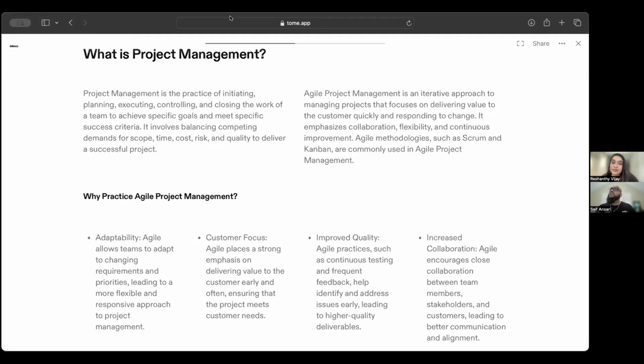So the technology department would go back to the drawing board and say, okay, they want to make these changes. Let's take a look at how we can make these changes. Sometimes it can be a quick change, but more often than not, it requires a potential re-architecture. And that's just one change. There could be 1,000 different changes that you need to make. Now, what is that doing? That's delaying the development of your product. That's extending your timeline. That's extending your budget. But more importantly, your product is not getting to market. The competition is already out there. You need to be out there ASAP. Like you got to be out there yesterday.